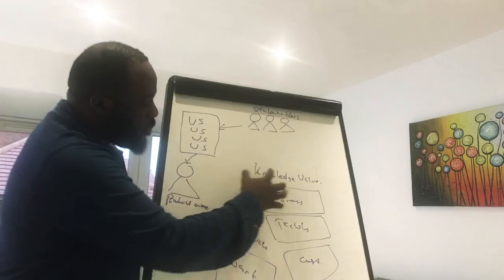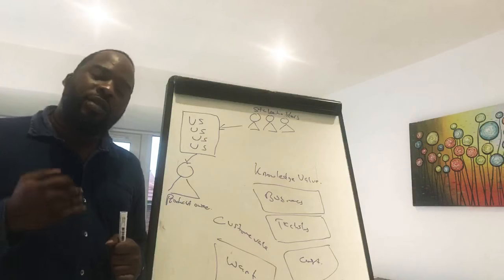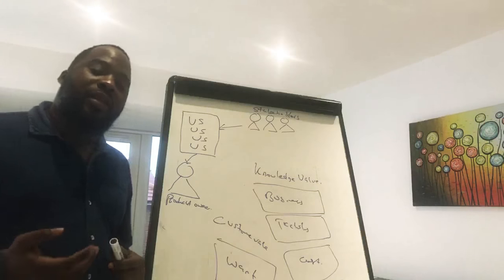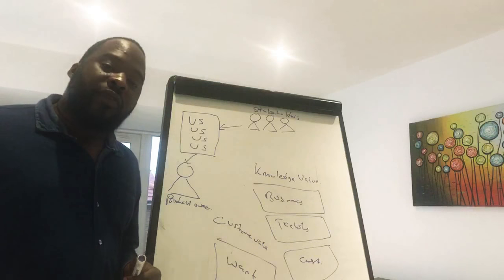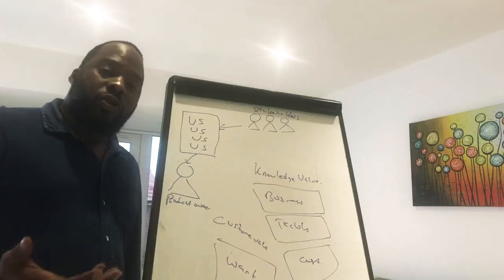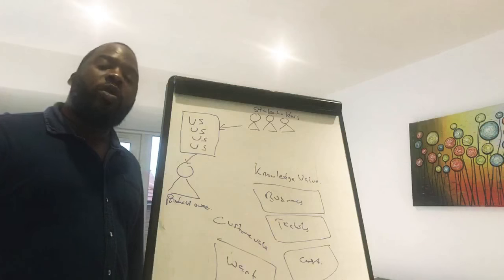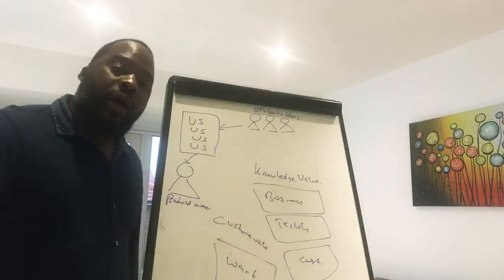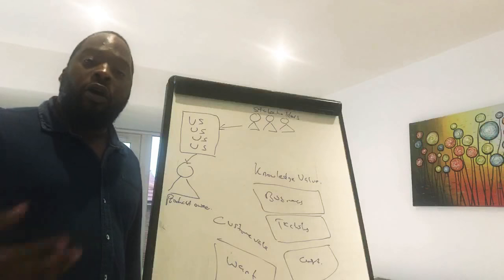So this is very much the product owner, and he sits down and prioritizes these user stories based on the most important thing that needs to be delivered in line with immediate business value, mid-term business value, and long-term business value. So that is what we call our minimum viable product. Give the customer exactly what they need right now, and then the system will continue to evolve as we add the next most important thing onto the system.